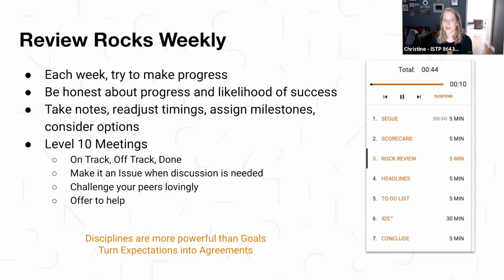Yeah, and I think it's important, that aspect of challenging each other. Well, it's not necessarily a challenge, but you're really just looking for insight. Like, is that person really doing okay with theirs? Because especially at the leadership level, everyone has their own functional expertise in the business. And so if you see a dependency that's going to get held up, whatever it is, that's your time to jump in and say, I think that's an issue. Let's drop it down. Don't feel like you're stepping on somebody's toes. Everybody agreed that those are the most important things and you're getting them done as a team, even though there is one owner. That's right.